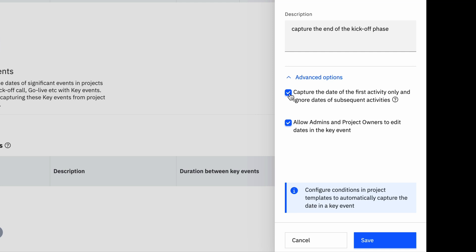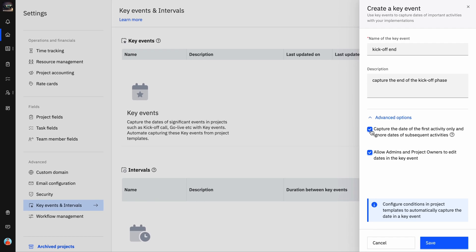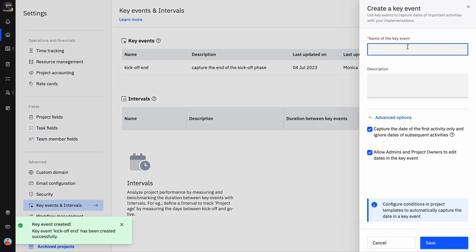However, if the same status change happens again for the kickoff phase at a later time, the date will not be captured. By choosing this option, you allow the admins and project owners to edit the key event dates in the project overview page. Click Save. Repeat the steps to add as many key events as you wish.